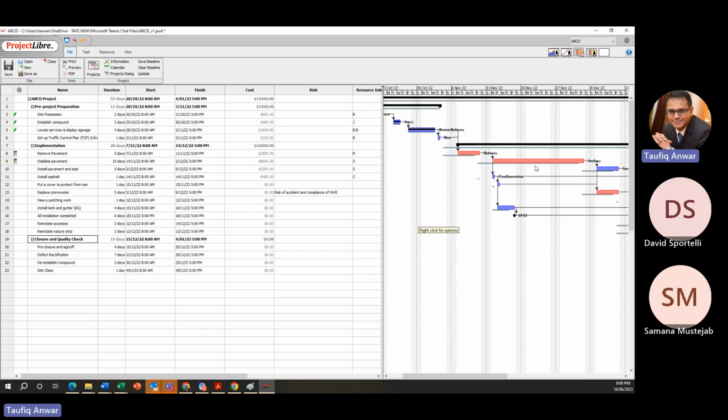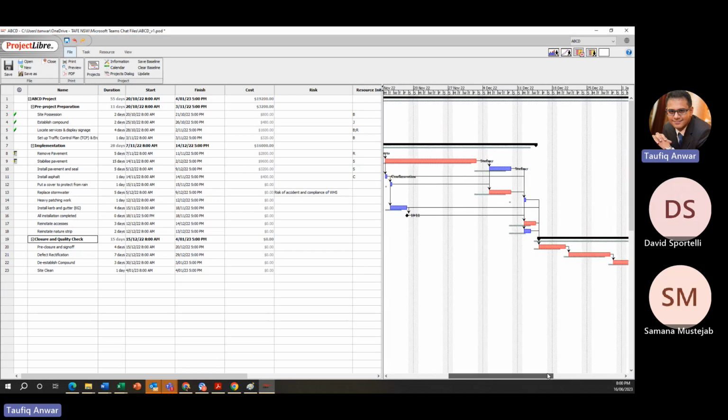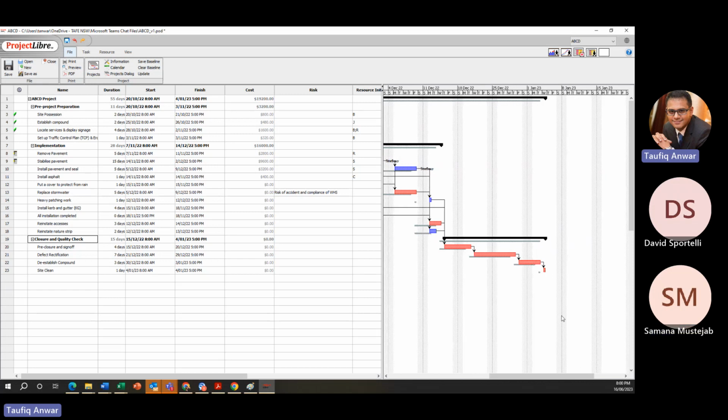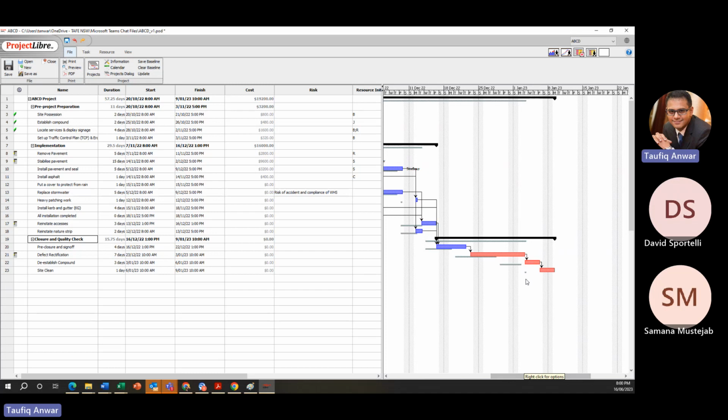So this shadow that you see is the baseline, and it's showing how you have been deviated for the entire project. So now instead of finishing by, I don't know, 1st of Jan 2023, it shows like probably you're gonna finish it by 10th of Jan. Probably there are some other things also happen. For instance, this task also been a little delayed. This one is a little delayed, something like that. Couple of things happen for which your project is showing probably you are almost a month behind.